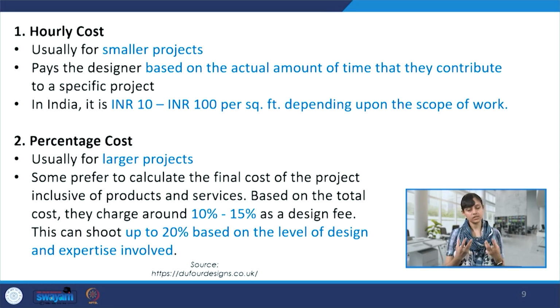And then there is a percentage cost, which is usually for larger projects where the scope of work is slightly elaborate. Basically, there is a total cost of the project and the interior designer gets a certain percentage as a design fee. It's usually 10 to 15%, but it could also shoot up to 20% if there is a very customized design and a high level of experience and expertise that the interior designer brings to the project.